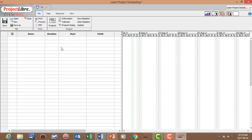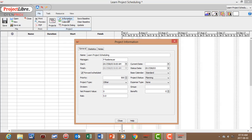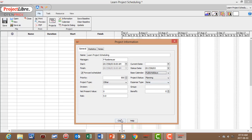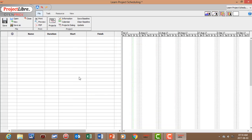Now we've created the base calendar. Let's set it for the project. Still in the File menu, go to Information, then Base Calendar. Currently it's set to the standard base calendar — let's change that to Public Holidays and close. Now we've set the base calendar. Let's continue to create tasks. I'll start by inputting the project name: Learn Project Scheduling.